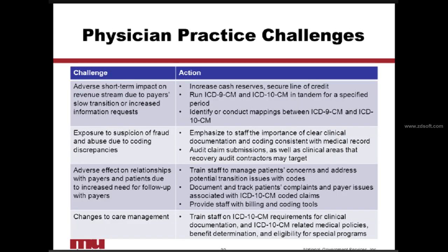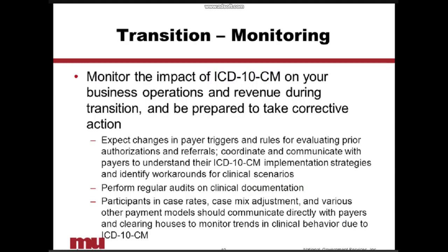Other parts of monitoring your transition is to keep track of what's happening on a day-to-day basis. Prior to the point of transition, you'll need to make sure that you have updated your forms and your superbills, and Alicia's going to talk about that, arrange for appropriate staff training, and order books for your coders. As of the date of transition, you want to very carefully watch the claims that are going out and the payments that are coming in to make sure that your payments continue on schedule and seem to be continuing at an appropriate rate. For internal monitoring, this mainly involves working with your coder to make sure that there are no issues with the ICD-10 codes.